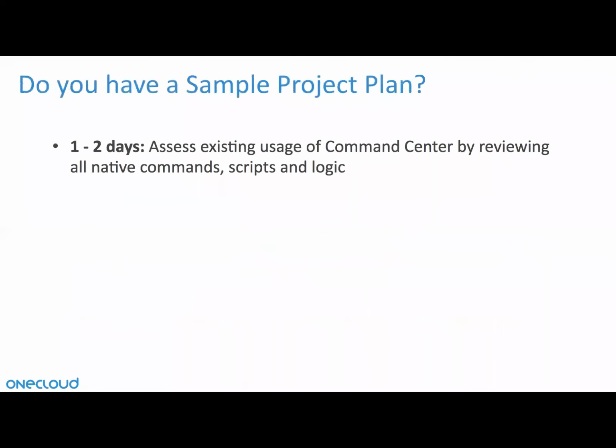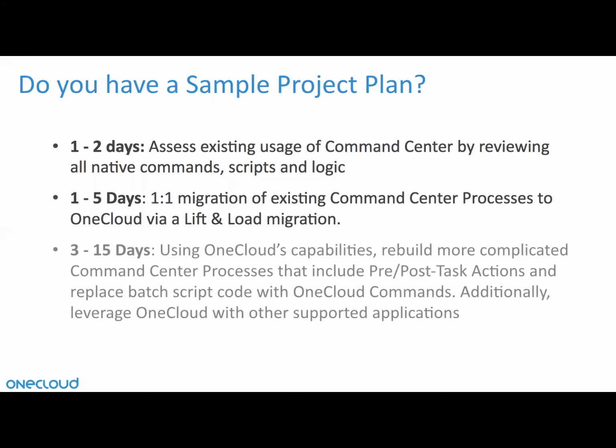And that's it. So now in terms of the project plan and the timing, and again, these dates and times are just rounding off, we're basing it on a typical scenario. But as far as us going in and reviewing what you have in Command Center, that's probably going to take 1 or 2 days. The 1 to 5 day range is probably our ability to migrate what you have in Command Center to Onecloud via the lift and load migration. That was the first phase. So that's about the 1 to 5 days.